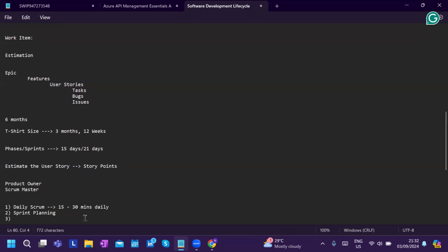The third thing is called backlog refinement. If new work has come which we want to do in upcoming sprints, we have to make sure that we define, document and write down every requirement in the user story properly and create a healthier backlog. So all the newly incoming items, we have to refine it, discuss it, and groom it in a way that as soon as the next sprint planning day comes, you can pick it up.